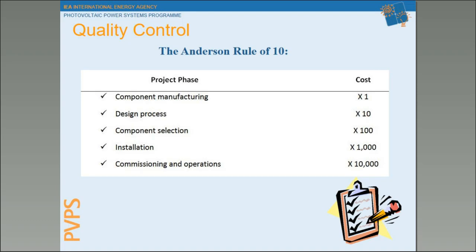This is not to say that a project cannot be successful using even substandard equipment or workmanship, as long as the risk of failure and the cost of repairs is accurately translated financially to define the financial cash flow through the 25 years of the project. So an important element of mitigating financial risk is to ensure quality control throughout the project, whatever that level of quality may be.